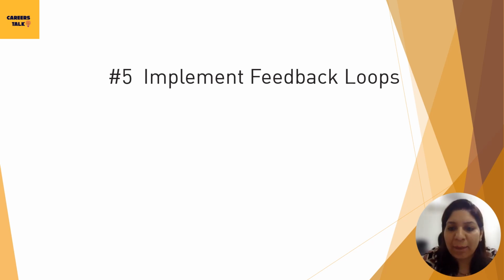To quote an example, one of the ways to get feedback is having daily meetings for 10 minutes or maybe a weekly meeting for 30 minutes to understand the flow in light of short-term goals or your quarterly goals. This really helps you to figure out where the problems are or what we need to really change, adapt, inspect, and then try to improve that new thing in our system.